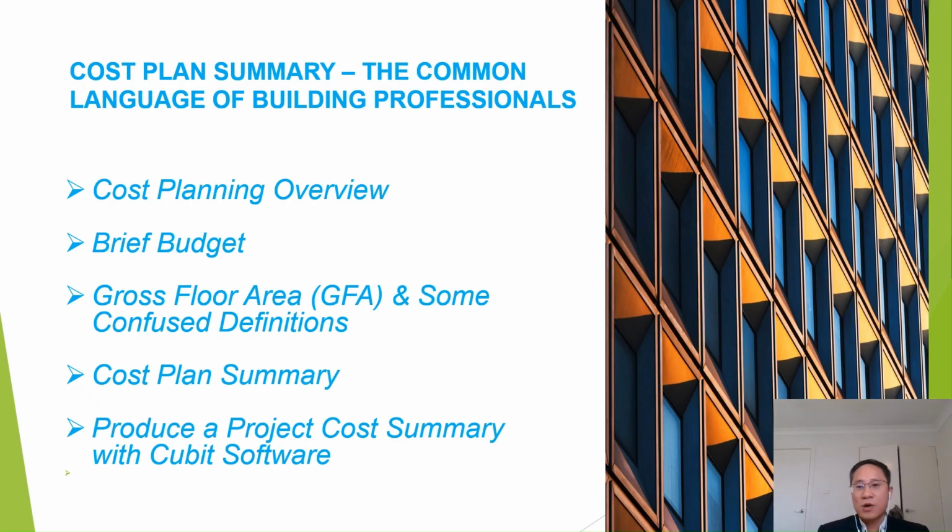And if you are a contractor's QS, you might have to prepare a cost plan summary in order to compare the tender submission cost with the previous cost data, in order to ensure your submission price is accurate and reasonable for that standard.